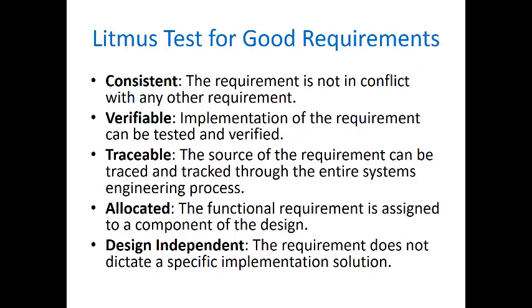But I'm not going to say things like, I want 100 bikes per station. That's a design decision. My requirement is 95% availability. We need 100 bikes per station. That's a design decision. So you have to make sure to differentiate between these two and don't mix them. And don't put something that is design related as a requirement.